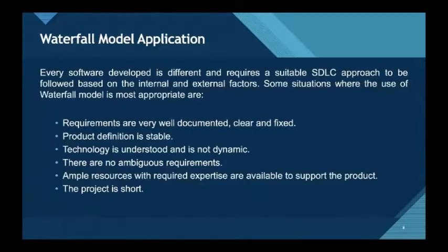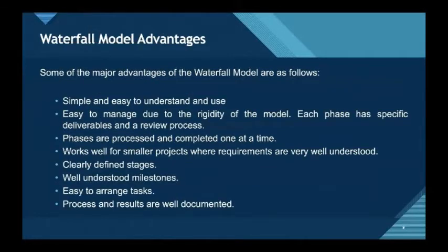Some situations where the use of waterfall model is most appropriate are: requirements are very well documented, clear and fixed, product definition is stable, technology is understood and is not dynamic, there are no ambiguous requirements, ample resources with required expertise are available to support the product, and the project is short.